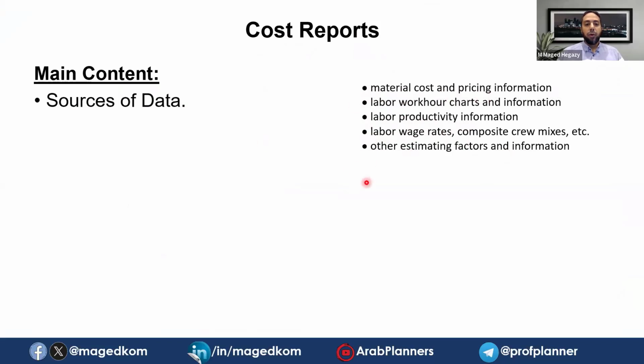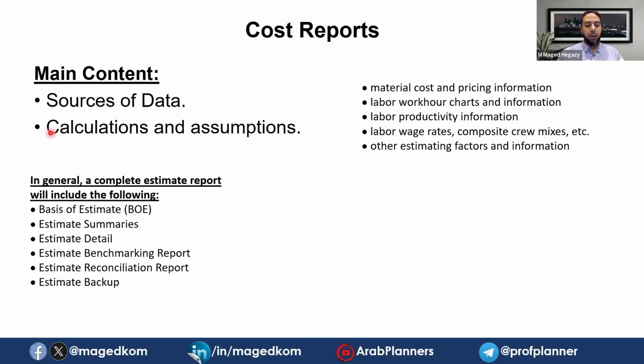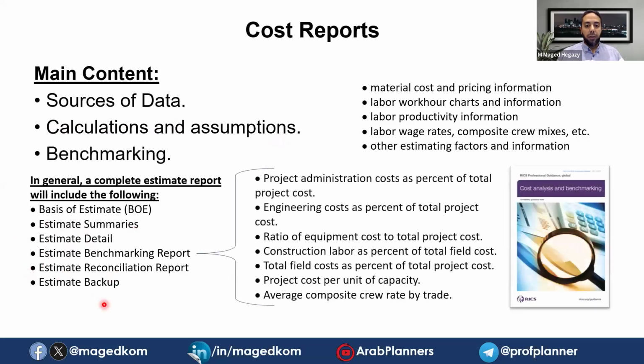So we need to do cost reports starting from the estimation and during the project, on a monthly basis, to know the situation of the project, including all calculations and all assumptions, the basis of estimation for the estimate, and benchmarking to compare with similar projects or similar items in the market to know how we are doing this business.